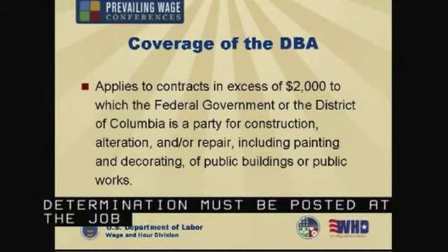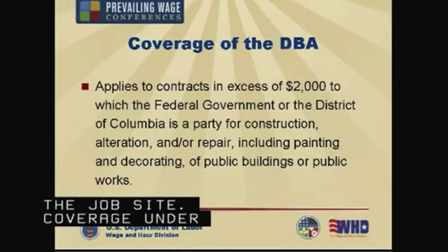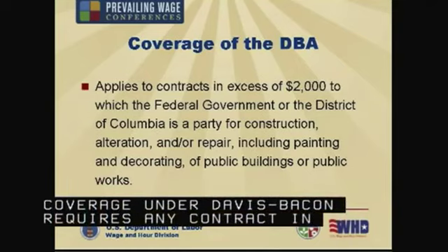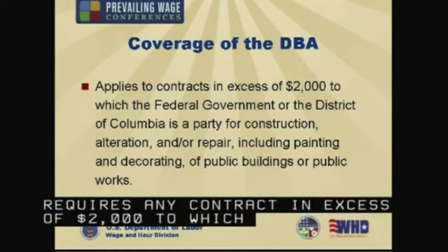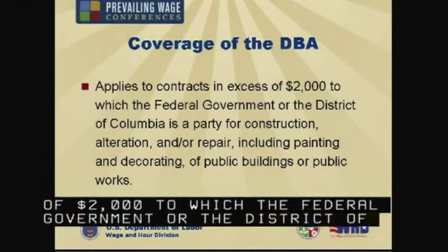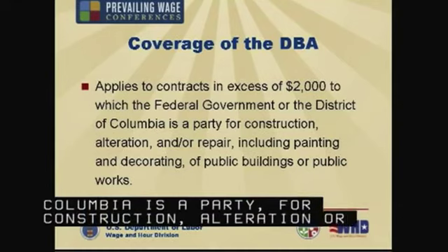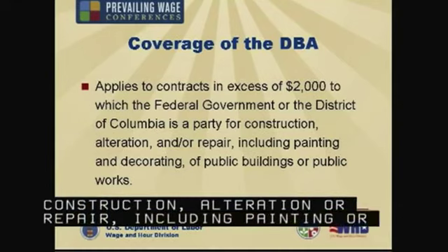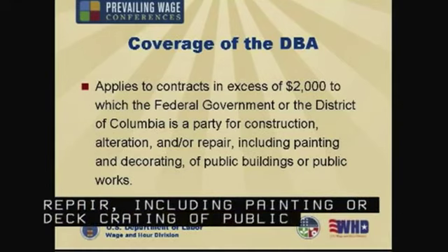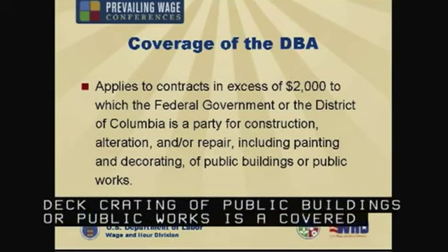Coverage under Davis-Bacon requires that any contract in excess of $2,000 to which the federal government or the District of Columbia is a party for construction, alteration, or repair, including painting or decorating of public buildings or public works, is a covered contract under the Davis-Bacon Act.